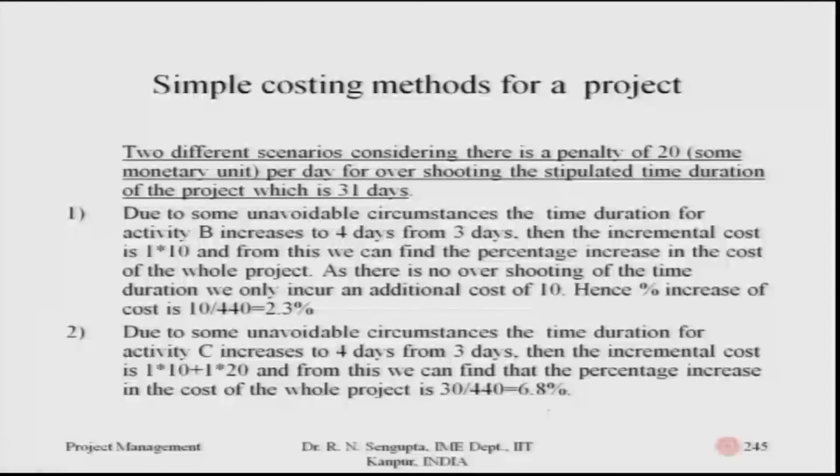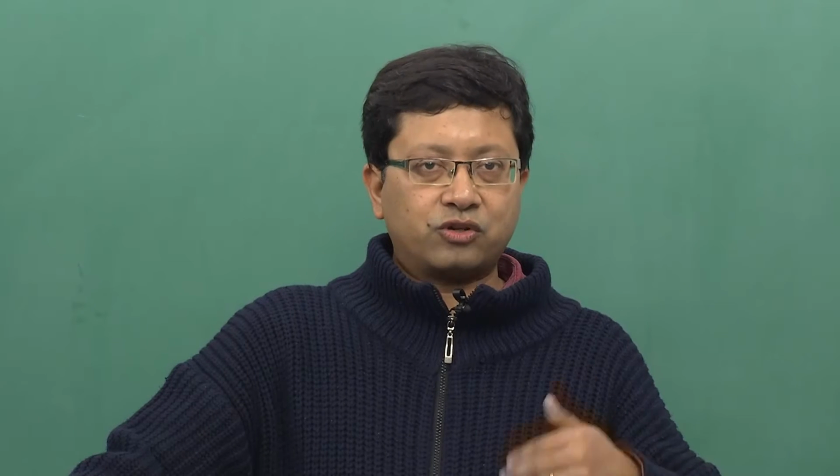From this we can find out the percentage increase in the cost of the whole project. As there is no overshooting of the time duration, we only incur the additional cost, which is 10. Hence, the percentage increase, considering the overall cost which was 440, is about 2.3%.